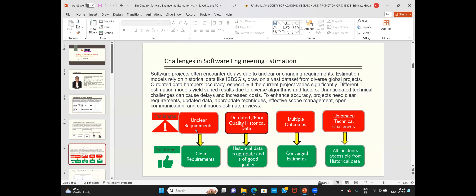Models can be existing ones already used extensively in industry, like COCOMO, or something tailor-made for your current project — a simple regression-based technique that uses context-sensitive data and derives patterns from historical data. All unforeseen incidents should be in the incident management system, so your unforeseen technical challenges are visible and you can readily tap into them. If you have all this in place, your estimation models will work correctly and be reliable.